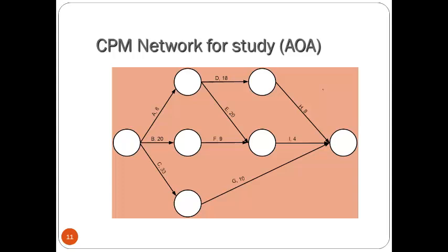we can shrink the activity time. For example, this activity H takes 8 days at a certain cost. But if we add cost, for example, if we add more people to the activity, we can shrink the time it takes, but we'll just add cost. Whether it makes sense to shrink that activity time, or which ones we should shrink, that's when the project progresses, we'll control it. Okay, so today we'll finish this.